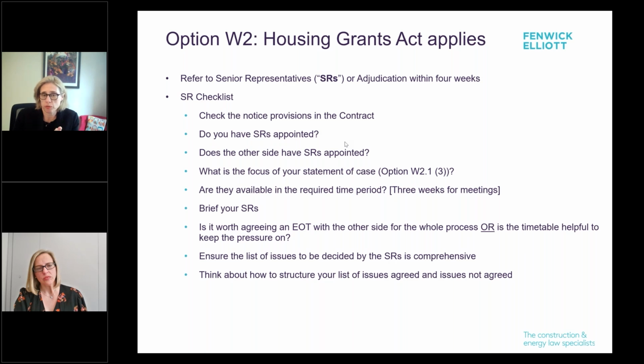You need to check the notice provisions in the contract. So for example, do you need to issue on CMAR? Do you need to serve a letter? Is email okay? Check those, do not get them wrong, and don't leave it to the last minute, because obviously that is an absolute deadline.